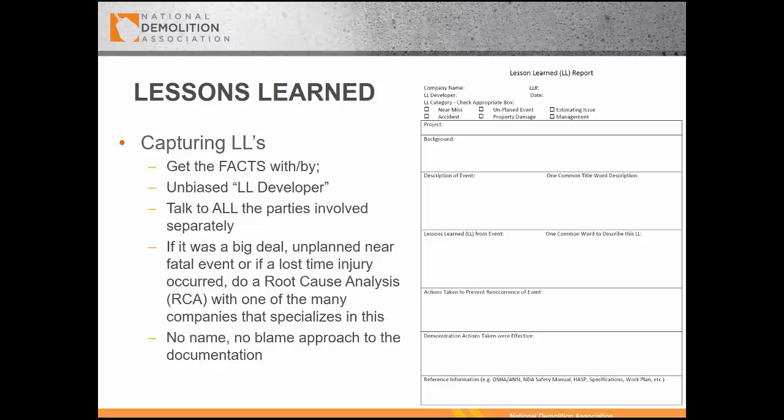We have some sample forms that I think we provide during the course, showing you what type of questions are often asked by the owners for you as a contractor to get pre-qualified. And some of those questions you should be asking from your subcontractors and your vendors, just to make sure that they're going to be around when you're ready to execute the project, or they have the correct insurance, or if it's a large subcontractor, if you're required to provide a bond, that they need to provide a bond. So hopefully that answers the question.